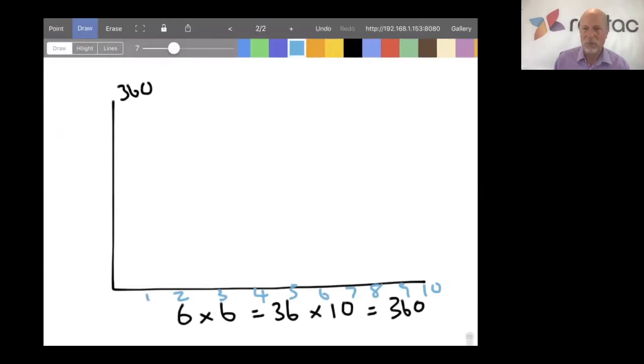Now, what we're going to do on a burn down chart is compare actual effort left against planned effort left. This is the key point. It's about effort left, not about effort spent. It's about effort left. This is what burn down charts look at: story points left. So after 1 day, theoretically, if everything's going wonderfully, we should have 360 minus 36 effort left. So we should have 324 hours of effort left.